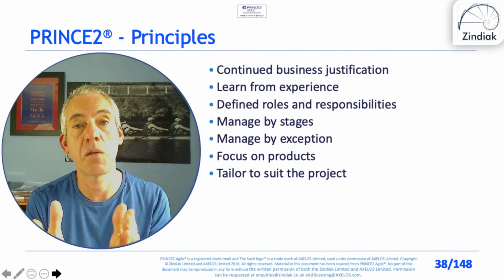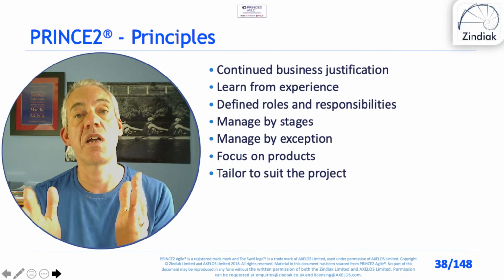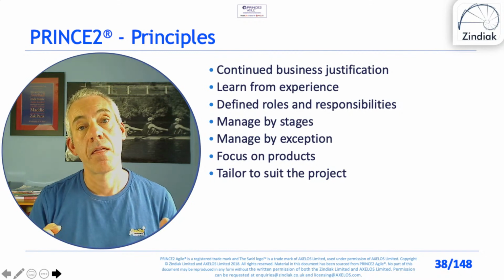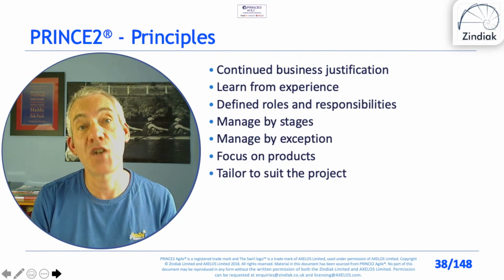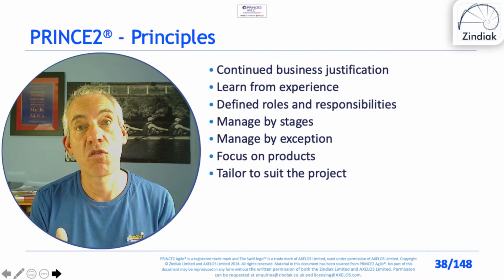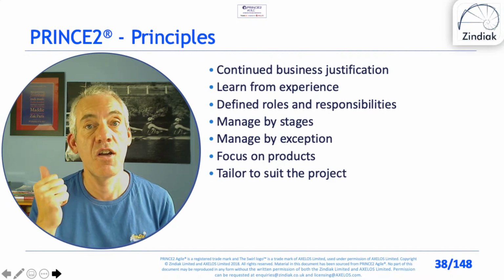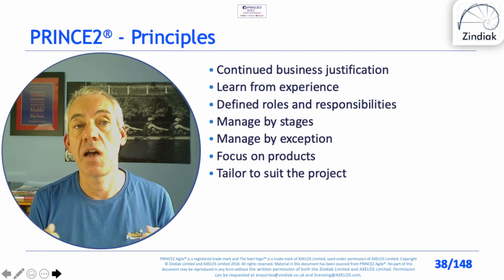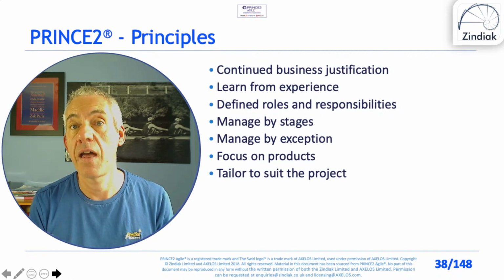It's a very agile approach, and the only question is, is there any tolerance on the stage? So if you're going more agile, you would have no tolerance on the stage of cost or time. It'd be fixed. If you're being less agile, you could have tolerance on there.